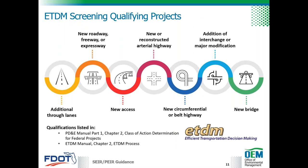FDOT uses the Efficient Transportation Decision Making or ETDM process to provide early identification of potential environmental considerations and transportation planning to streamline project delivery. Projects that qualify for ETDM screening include those that propose additional through lanes such as capacity improvement projects, new roadways, reconstructed arterial highways, the addition of interchange or major interchange modifications to a freeway or expressway, and new bridges. This list of qualifying projects is provided in Part 1, Chapter 2 of the PD&E manual and in the ETDM manual.